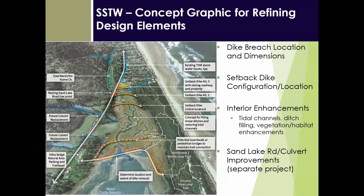So kind of to Dave's point, there's a partial fish passage barrier at the existing culvert in Tide Gate. And so the funding agencies really want that first barrier addressed before they put money into the additional barriers moving upstream from a fish passage perspective. And you're right, the function of the tidal restoration depends on what's happening at those creek inflows. And so our model will include the creeks as well.